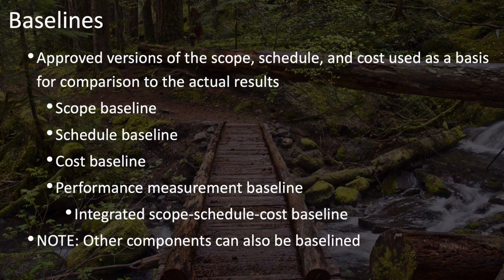Now, those are the minimum components that should be baselined, but there may be others. For example, you may need to baseline the quality requirements and make sure that those are not changed without proper approval and without going through the perform integrated change control process.